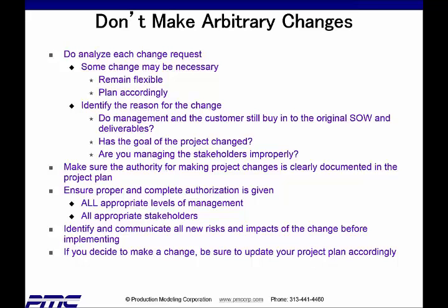Don't make arbitrary changes. Do analyze each change request. Some changes may be necessary, but you need to remain flexible and plan accordingly. Identify the reason for the change. Do the management and customers still buy into the original scope of work and deliverables? Has the goal of the project changed? Are you managing the stakeholders improperly?